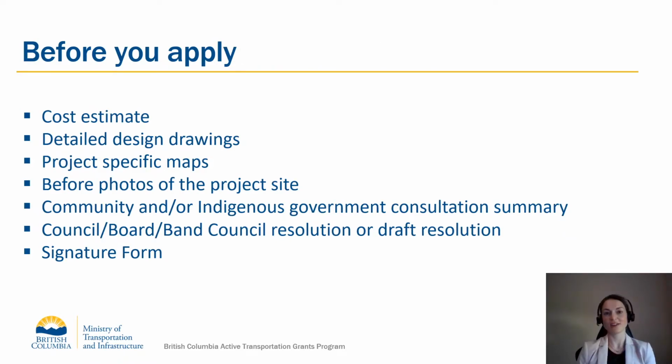In order to be considered for infrastructure grant funding, and before you complete the application, you'll have to have a number of documents ready to demonstrate the project is shovel-ready. A detailed checklist is available as part of the application and will be reviewed again near the end of this informational video. Some of the highlights include a detailed cost estimate, detailed design drawings, project-specific maps, before photos of the project, summary of community or Indigenous consultations to show community support, council, board, or band council resolution or draft resolution, and if drafted, it will have to be received no later than December 1st, 2022 for the project to be eligible.